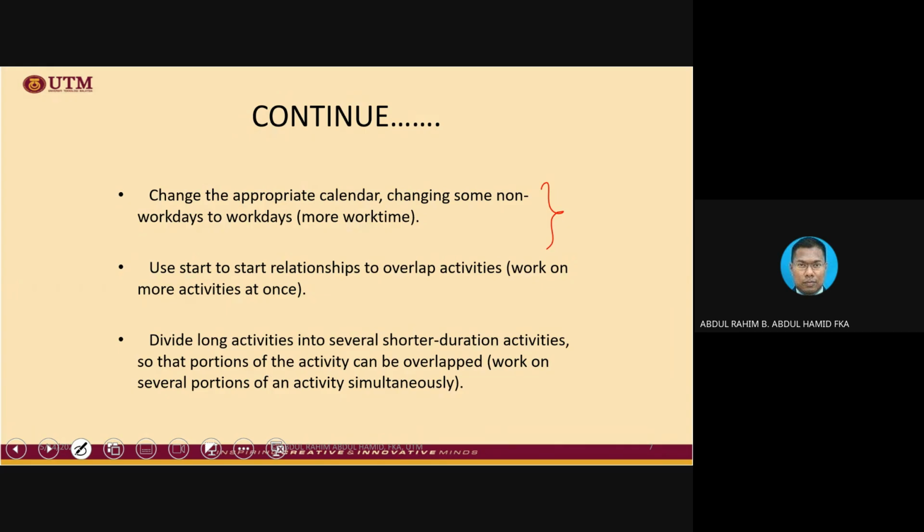Why not? Let's say we have many public holidays incorporated into our calendar, which is sometimes not necessary. Under Malaysian law, for instance, there are only a few mandatory public holidays. So if you want people to work on a mandatory public holiday, you need to pay extra anyway.